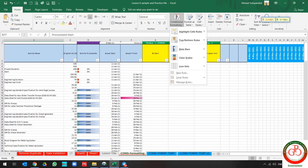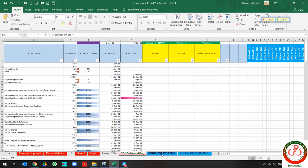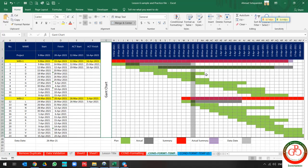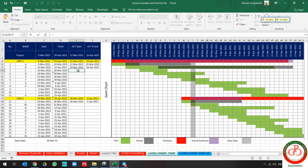But if you like, you can draw a Gantt chart like this by Conditional Formatting. If you want to draw a Gantt chart, you need a start time and finish time.